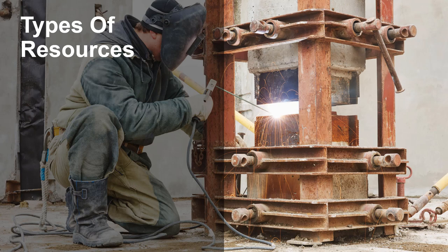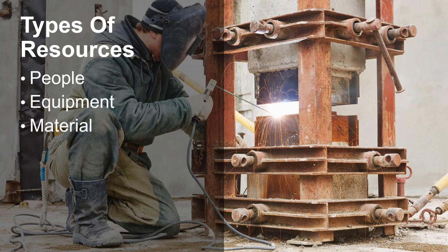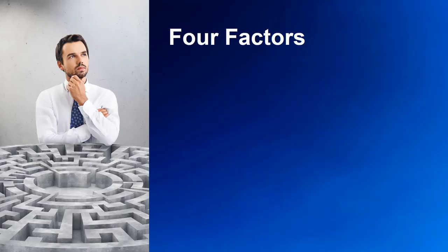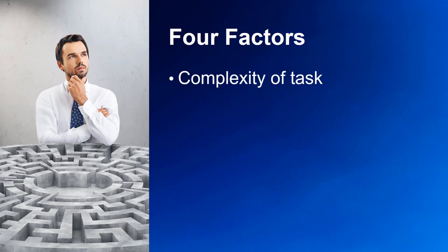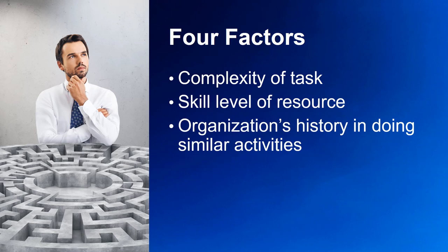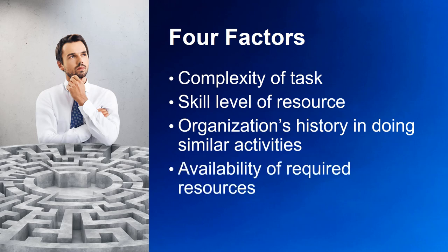The Estimate Activity Resources process helps us to identify and quantify the resources required for each activity. For any given activity, we may require some or all of these resources: people, equipment, material, as well as goods or supplies. When you estimate resources, you should also consider four factors: the complexity of the task, the skill level required of the resource, the organization's history in doing similar activities, and the required resources' availability.